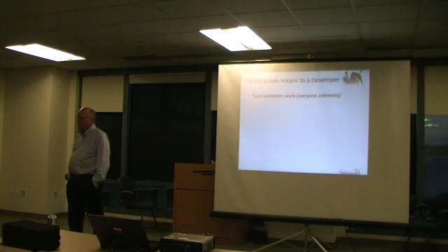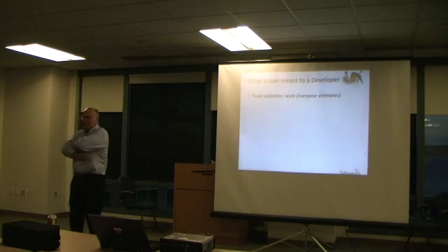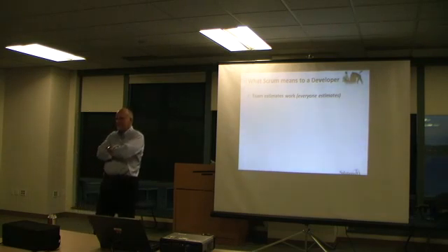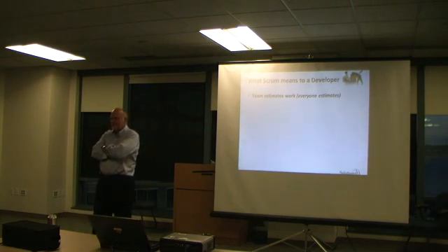Okay. I was going to say, your flaw in the premise is not that estimating is hard, it's that accurate estimating is hard. Okay. But the point is that XP and Agile don't ask for that. They don't ask for accurate estimation. They ask for relative estimations, which are then applied to your velocity to actually give you projections. And the real world is you have limits.